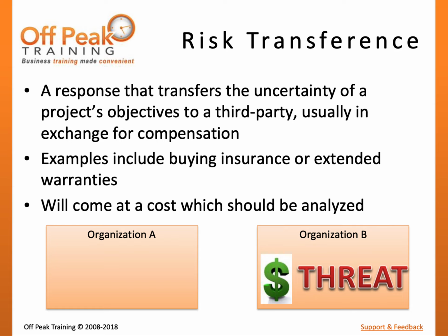In the assembly example used earlier, a project team may choose to purchase weather-related insurance, which will cover the costs of a delay and/or damage, perhaps hurricane insurance. Our team with sensitive information may choose to buy a security product which guarantees the confidentiality of their information and takes responsibility for any associated liabilities.